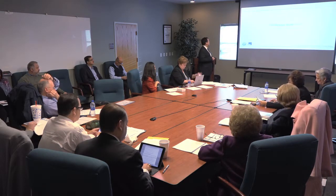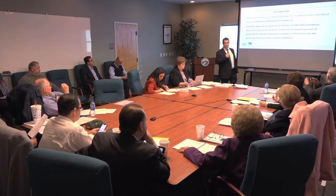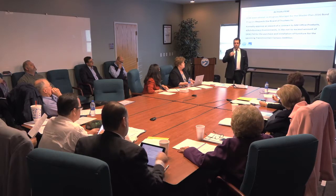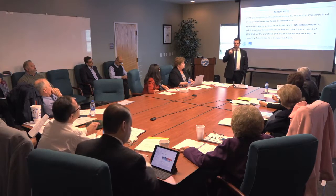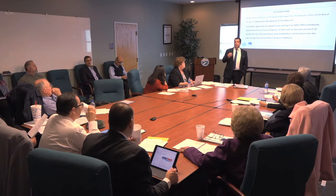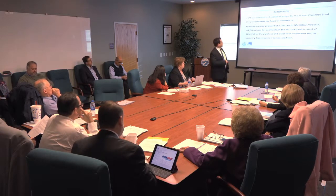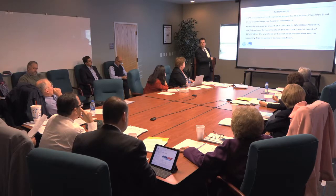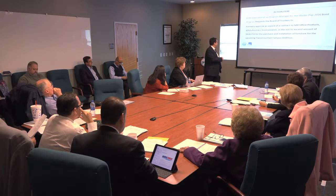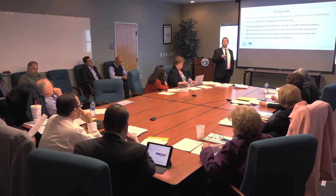We have two action items. The first action item is the purchase of furniture for the Trans Mountain campus. I just want to caution you that this won't be the last time I will be presenting this to you for Trans Mountain. We need to proceed with ordering the furniture. It will be two separate POs. One is Business Environments. We know now the other one is a Smith company, but we didn't know that when we were doing the agenda. So in order to keep up with the way it's supposed to be, this is our budget, and I guarantee you won't go over that. We'll probably come a little bit under that number, the 4,750. But right now, we're asking for your approval on the deal for Business Environments, so we can proceed with ordering. It's the majority of the furniture.